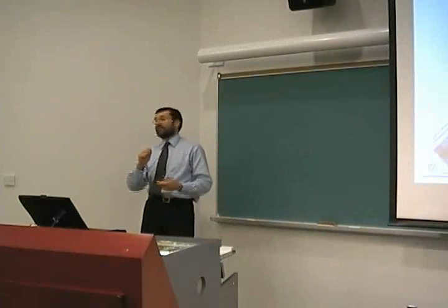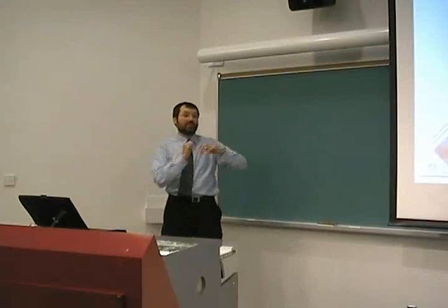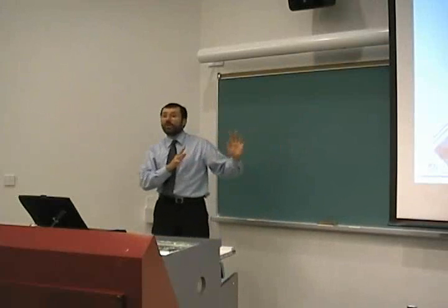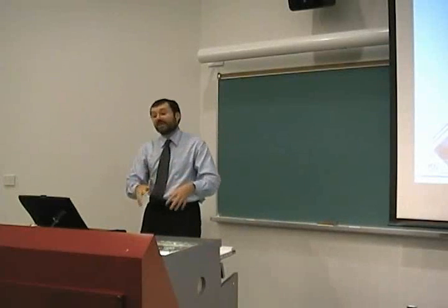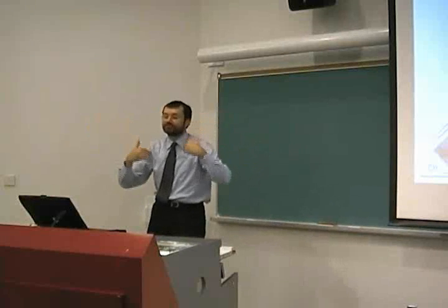If you start saying, yeah, we'll do this, we'll do this, we'll do this, and then you go out and analyze and you realize that that's too much, that's too big, or that's technologically infeasible, or other clients and other users tell you different things, well, then you're going to have to go back to your first user and say, sorry, we can't do what you just said. And the first user is going to say, but you said you would. So don't commit yourself early on. Early on, it's information gathering.